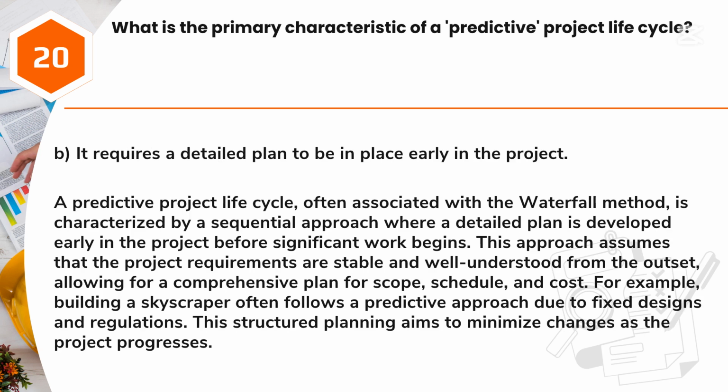Answer: B. It requires a detailed plan to be in place early in the project. A predictive project life cycle, often associated with the waterfall method, is characterized by a sequential approach where a detailed plan is developed early in the project before significant work begins. This approach assumes that the project requirements are stable and well understood from the outset, allowing for a comprehensive plan for scope, schedule, and cost.